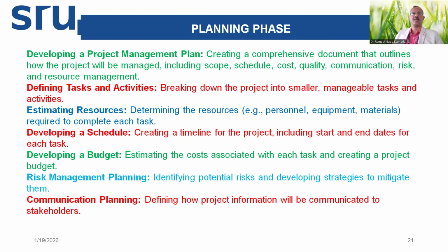So for example, a multi-storied building is a project. Now acquisition of land, acquiring land, purchasing land, then soil testing, then foundation work, superstructure, various activities related to civil, mechanical, electric, electronic, plumbing, air conditioning, furniture. All these. We make a work breakdown structure from the scope and deliverables so that it is properly managed by